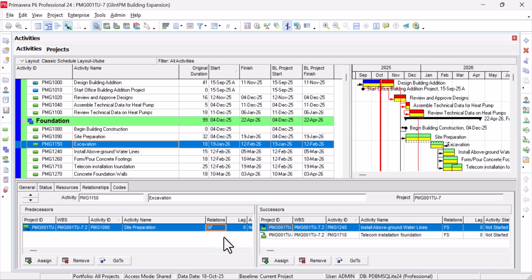If by any mistake you come across it, don't waste time, don't hesitate, change the logic, or analyze your schedule and look at what the right thing to do is. The best logic is finish start, FS, because that gives you the perfect way to manage your schedule and to track the progress.